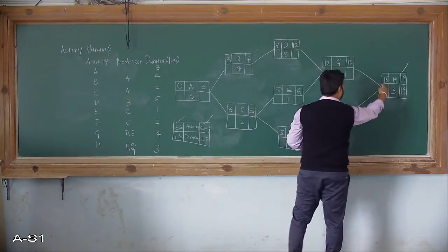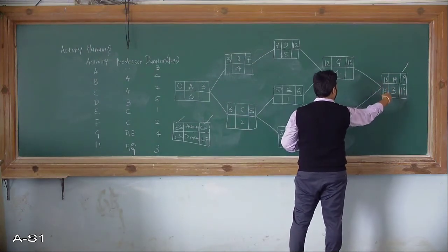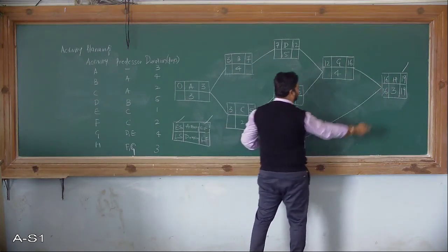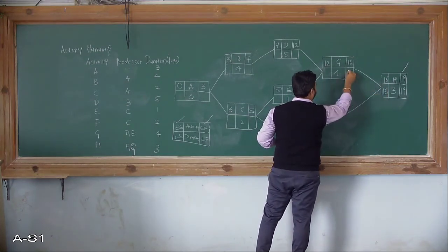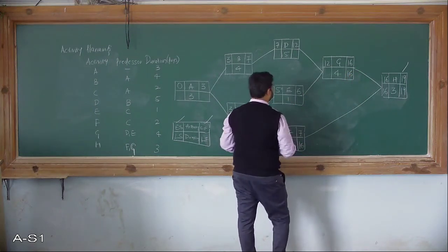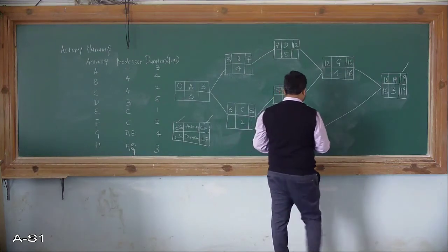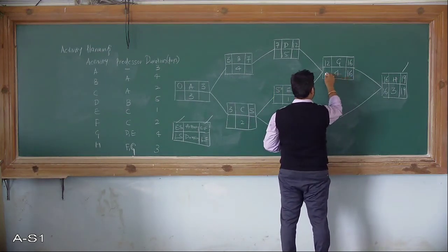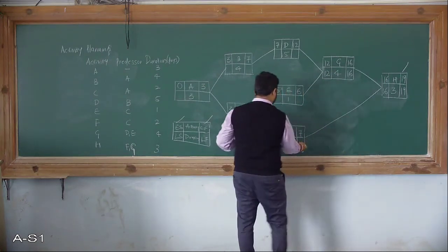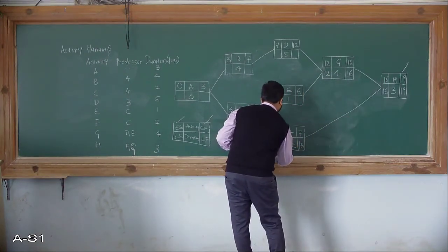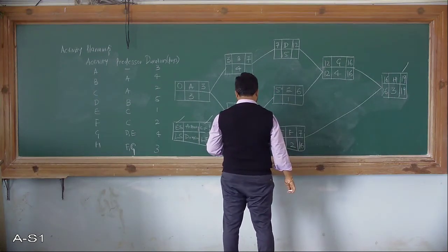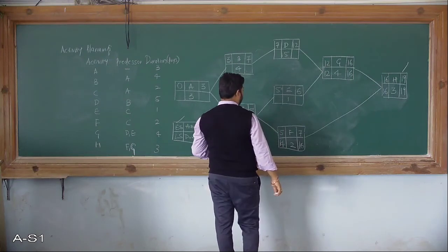So this late start becomes the late finish for these two activity values. So you can observe here 16 comes here, and here comes the 16. Okay. So 16 minus 4, 12 again. Here we come 16 minus 2, 14. 16 minus 2 is 14.